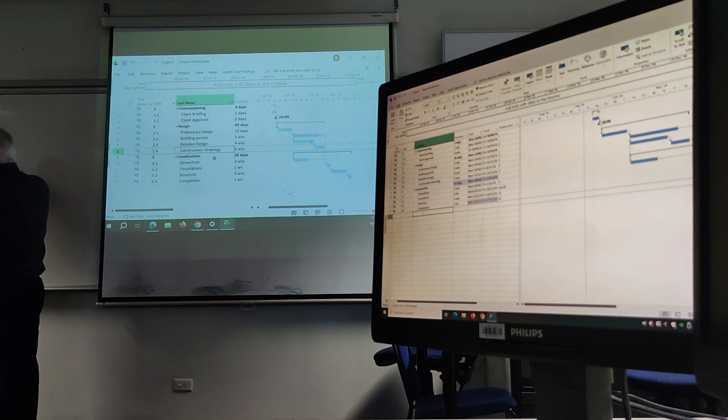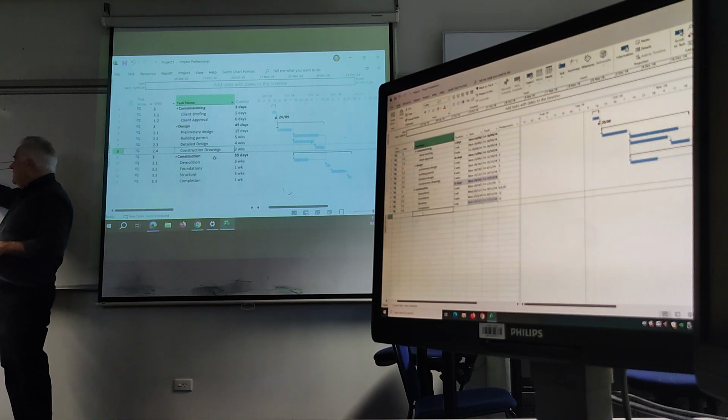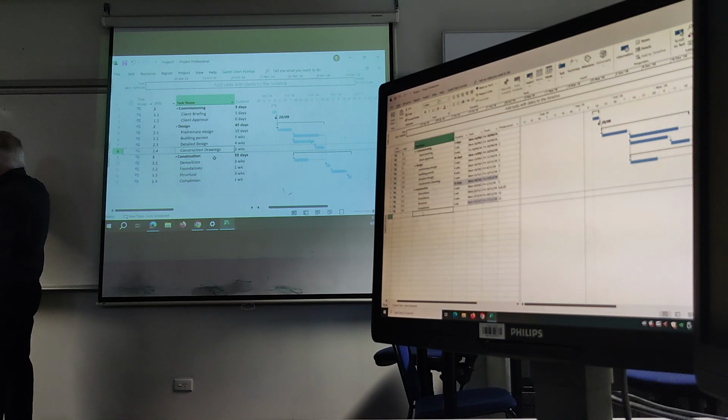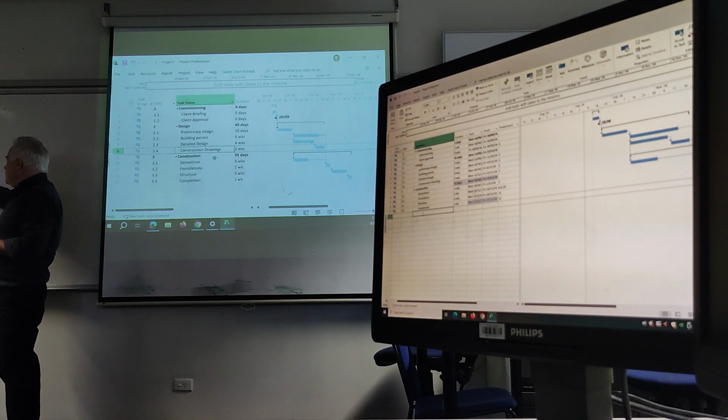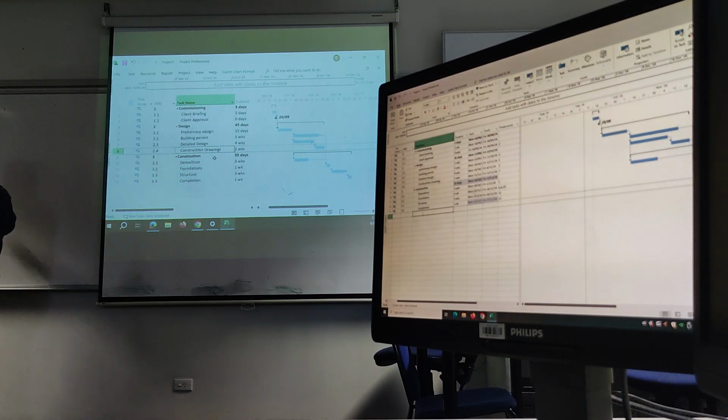And then we've got the construction drawings. But then we look at it, we say, you know what? If the detailed design people, the construction drawings can actually start 2 weeks earlier. We can overlap it. Because these guys start with a design, they produce enough design for these drawings to start, and then they do it hard. So what's the advantage of having that lead there? Well, it makes the overall time shorter. It makes the time shorter, okay? So the other one is, we've got there, what's the example I've got there where there's lag?